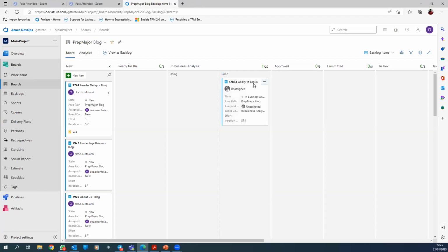We are coming to the end, so I'll be quick. When you're speaking to your PO, your story should already be done. That means you've put everything you need to put in. If there are wireframes, you've attached the wireframes. Okay, I'll show you where to put all that. If there are documents, you've attached the documents. If there are process maps, you've attached the process maps. Everything is done. You put it here.